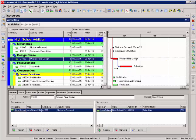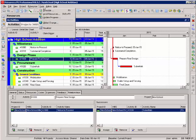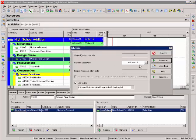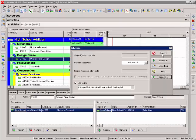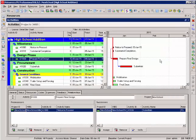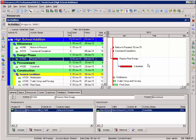Now you'll notice my schedule automatically calculated. I have my settings set for auto-calculation using my tools, schedule, options and the fourth checkbox down says schedule automatically when a change affects dates. I close that, hit schedule to save that setting and my schedule will calculate automatically.